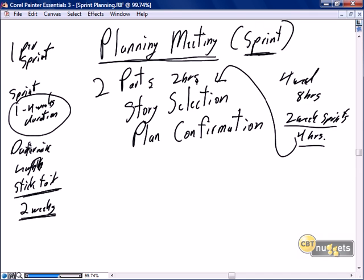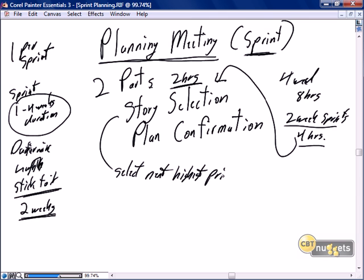We spend two hours doing story selection. We go to the product backlog with the business owner and select the next highest priority stories. The product owner is fundamental to story selection, obviously picking the stories that provide the most significant business value, but the team will influence that selection.